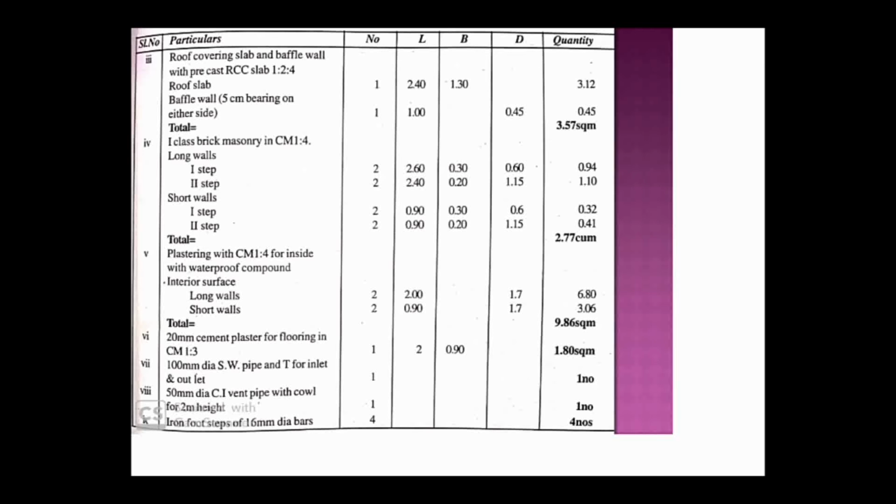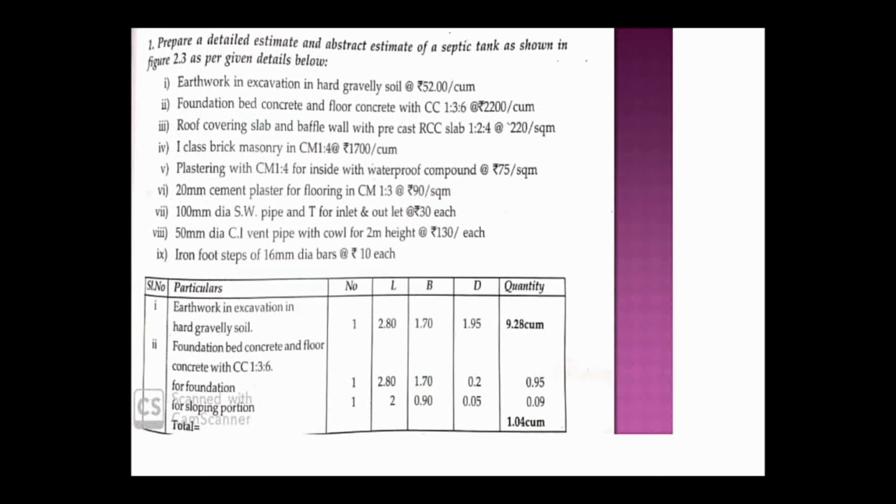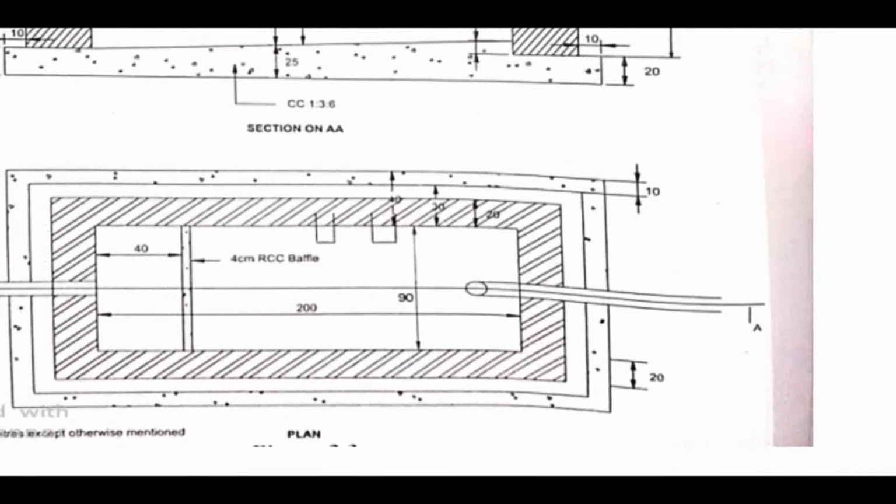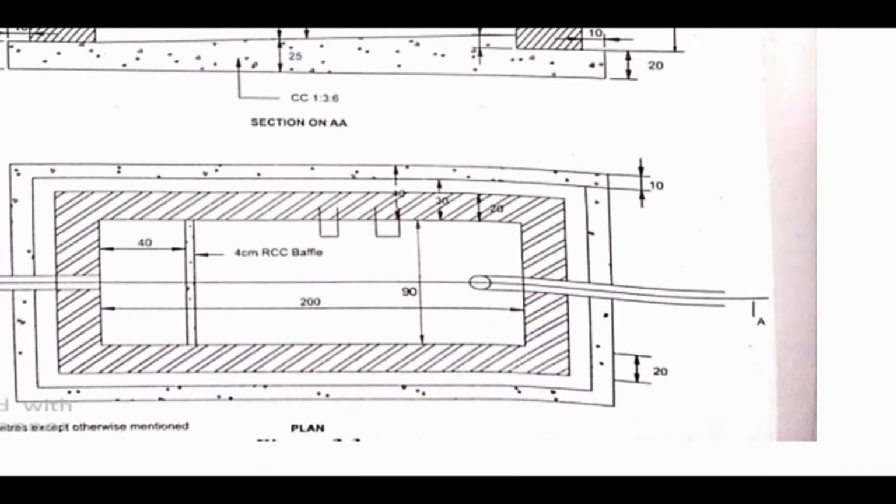In the same way you have to do it for the short wall. For that, as I told, the corner portions that we had considered already in the long wall, again there is no need to consider in the short wall.